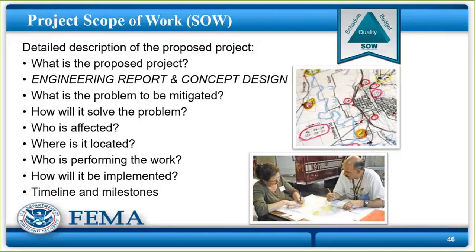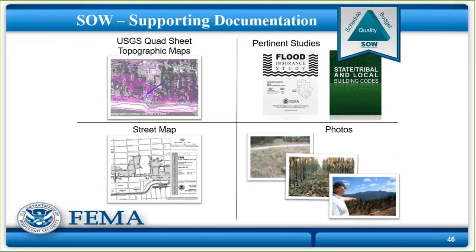And that's also a flood-prone season, so we don't want to get too much mess. And then we're going to uncover it, and we're going to do the foundation excavation, and we're going to build the project in the next dry season. Okay, that's the kind of thing. How will it be implemented? Okay, and timelines and milestones. And again, start your timeline after the award.